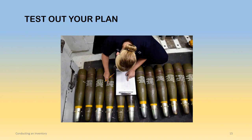So there are things like an earthquake or perhaps a pandemic or staff turnover. So you want to add a contingency to your timeline. If you're a small organization and you calculate your collection inventory would take maybe a year, I would add 3 months to that at a minimum. If you were like us, considered a mid-sized collection, we figured 3 years and it took us almost five. So there will be unforeseen things that just get added or slow you down. So definitely add some contingency time.